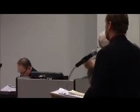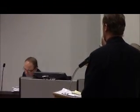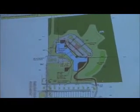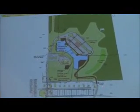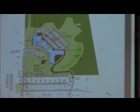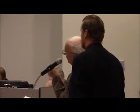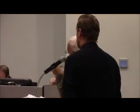One other thing about the stormwater that I neglected to mention was there were some issues downstream past the site with a pipe that was only 24-inch diameter. It's also been filled up with silt and wasn't operating as it should. As part of the comments was to analyze that downstream system to see if it could take our capacity. We found out that we would need to replace that with a 36-inch diameter pipe.